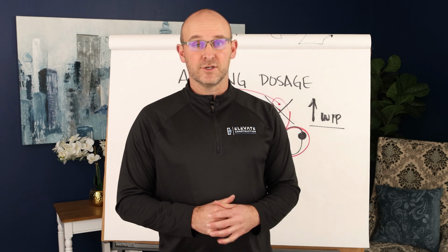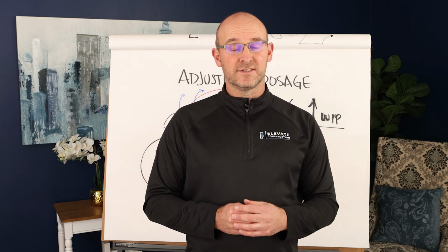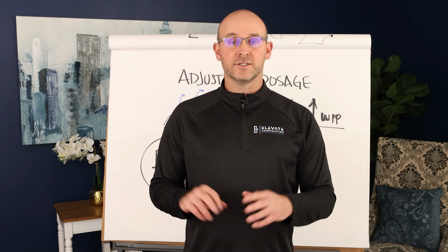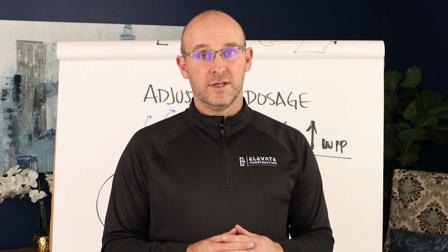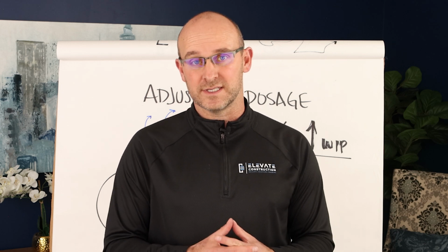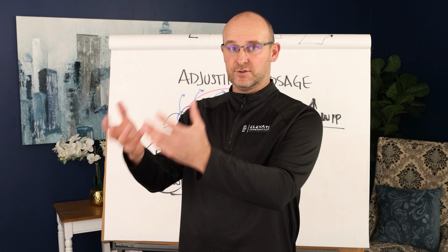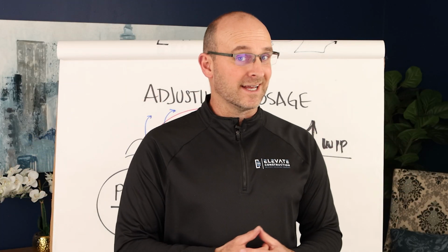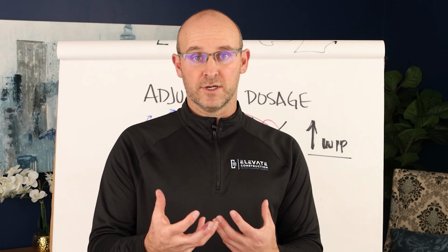Like, let's say you're a manager and you're incentivized to take on more projects. And actually that's a really good example. I've seen many times project managers get promoted because, oh, I can run 9 projects or I can run 15 projects. They're not running 9 projects. They're not running 15 projects. They're barely overseeing 9 or 15 projects, not well, at the expense of the team, right? So if you have incentives that say you have to put in this many pieces, you have to do this much work, you have to have this much product, or you have to have this many open tasks, that's a clear sign that you have the wrong dosage and you're going to increase work in progress.